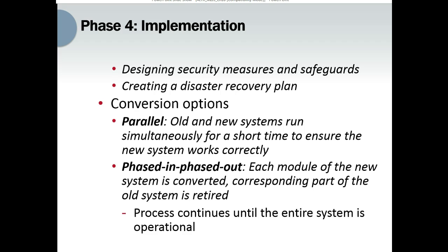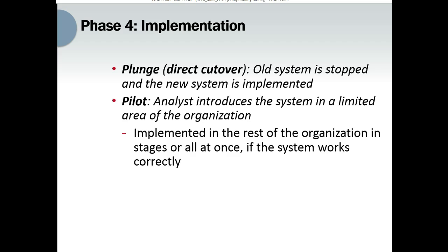Now let's look at the plunge direct cutover. In this type of conversion, the old system is stopped and the new system is being implemented. This approach, compared to the other conversions, is risky if there are problems with the new system, but the organization can save on cost by not running the old system and the new system concurrently. So there are disadvantages and advantages to using this type of conversion.